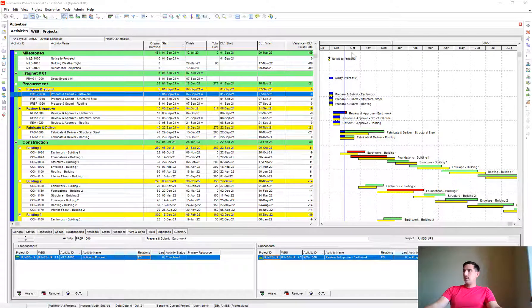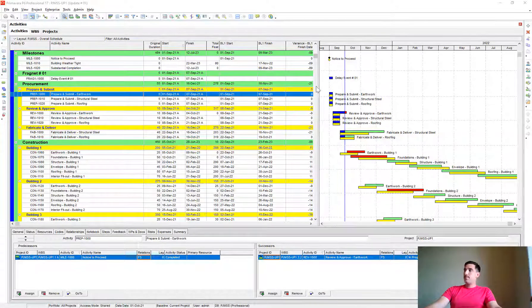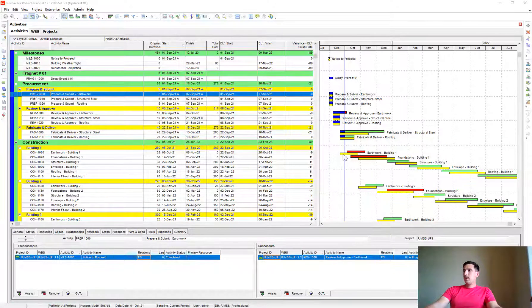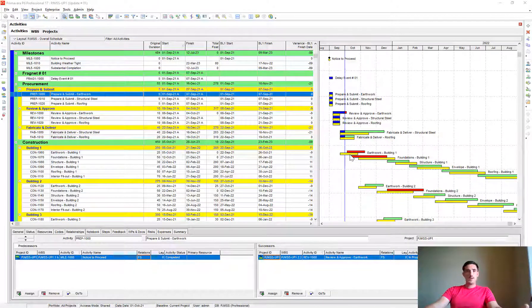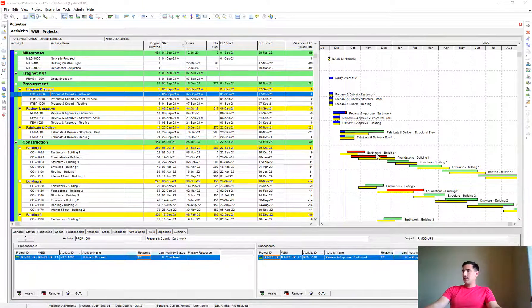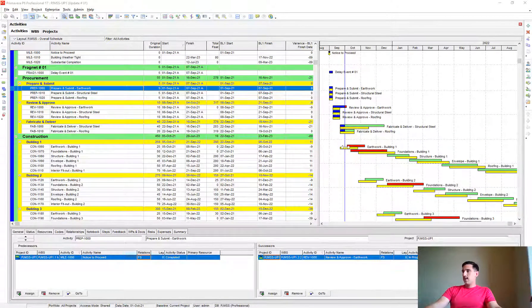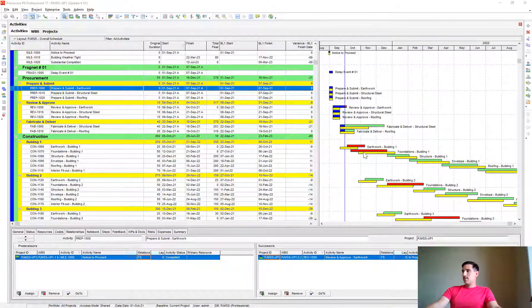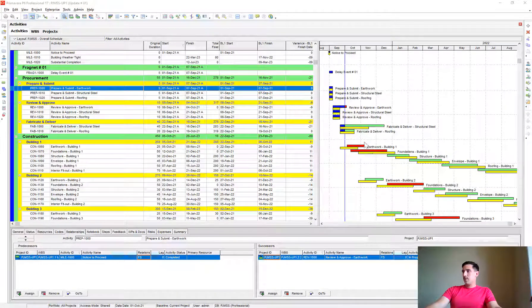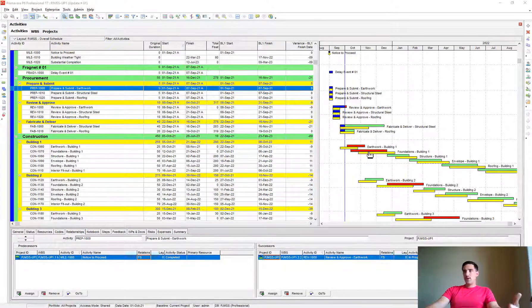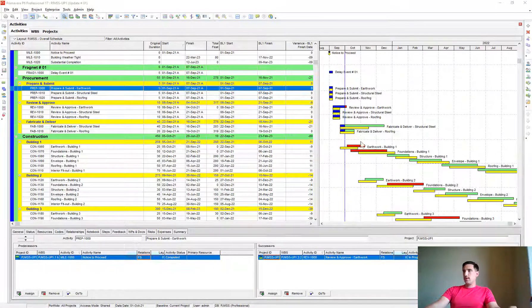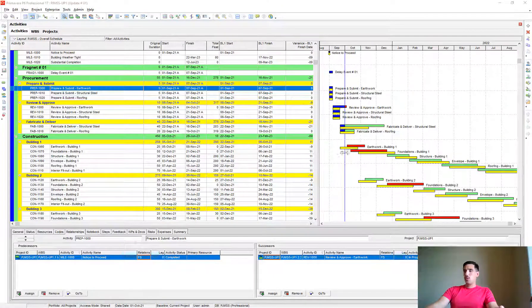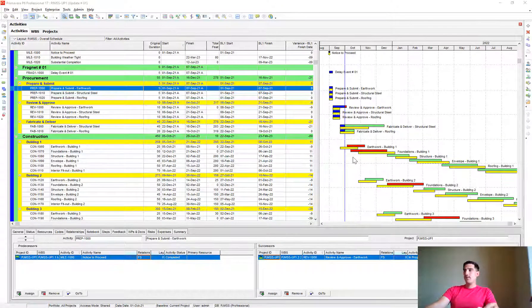In our case we have our current update open and the yellow bars reference the original baseline that we're comparing back to. I can see here the yellow bars used to be in sequence and now they're running concurrently and you're wondering what happened between the two schedule files. There must have been a relationship change but I don't quite know what it is without opening up the other schedule file.